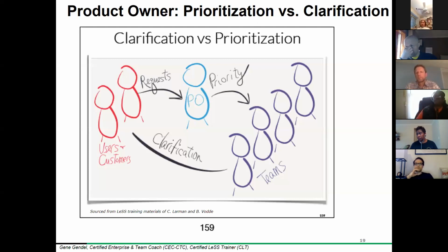Between 2 and 8 teams, it's humanly possible and very reasonable for one product owner to support up to 8 teams. So, the LeSS organizational construct, I should be using the proper term, the LeSS product group, is built of 2 to 8 teams. Okay.